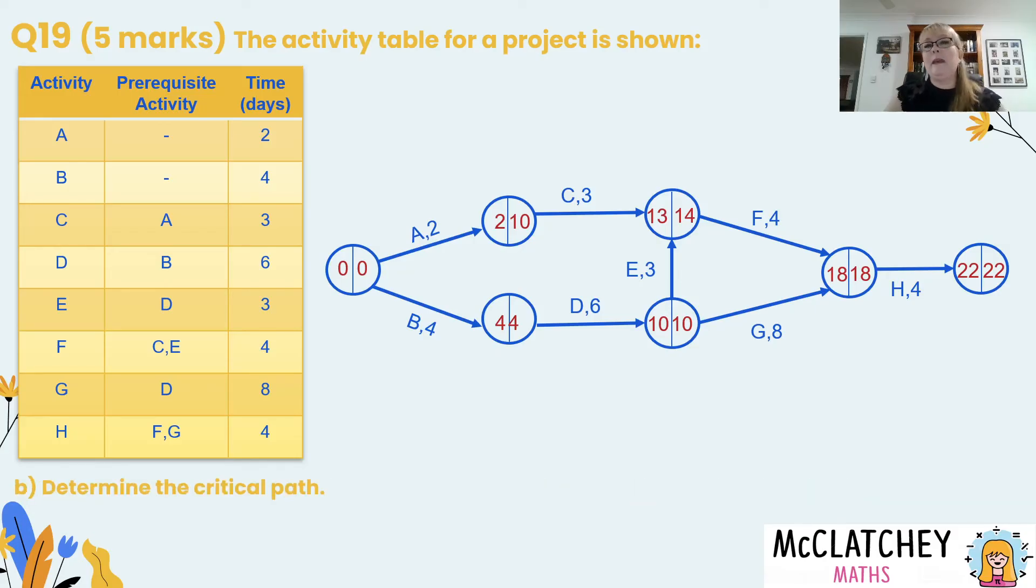Now we're on to part B. We have to determine the critical path. This is the pathway through the network that takes the longest to get everything done and the reason why it's the critical path is that anything that falls off the wayside on that pathway will make the whole project blow out or take longer than it should. Now the way to correctly identify your critical pathway is to look for the vertices where the number is the same on the left and the right hand side. So we can see that's our bottom pathway here. Now when you're actually determining the critical path you actually need to write down the letters of that pathway. It's going to be B, D, G and H. So then that's our critical path that earned us our fourth mark.